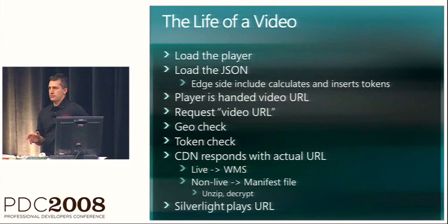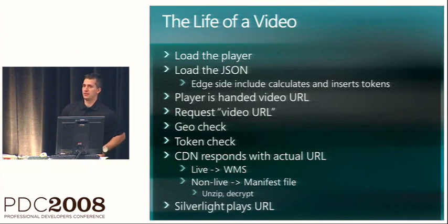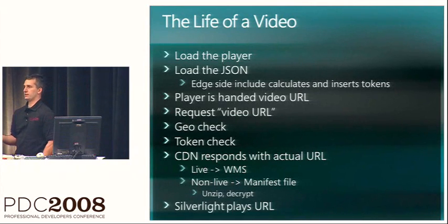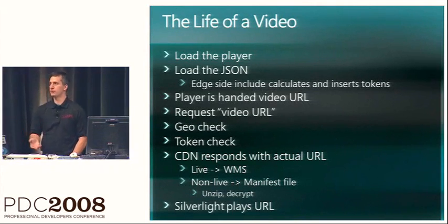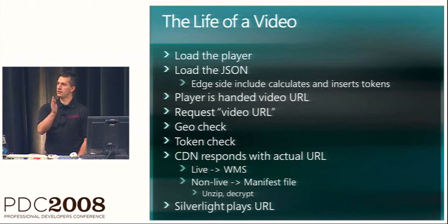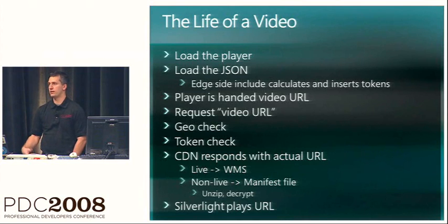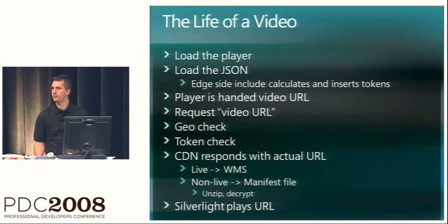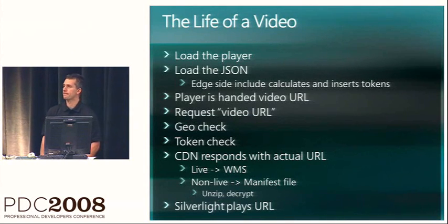Well, the nice thing about Mix, so you have to remember what happened during that time frame. The nice thing about Mix was a forcing function to get feature complete on Silverlight, fundamentally. So we walked into Mix pretty much feature complete on all the features that were in there, and then we were in basically triage, bug fixing, tweaking, performance mode. So the majority of the features, other than this adaptive streaming piece that I was talking about, was all in the box.